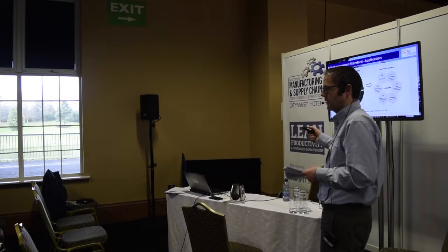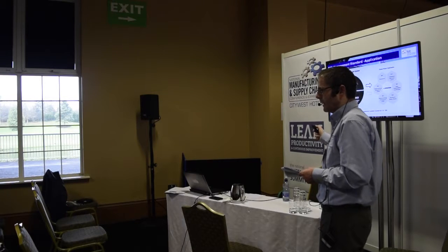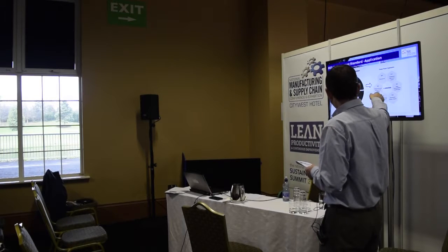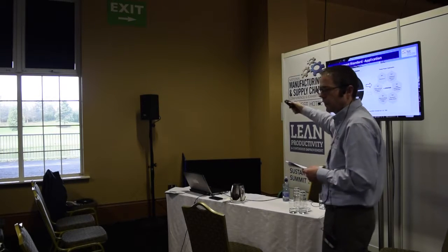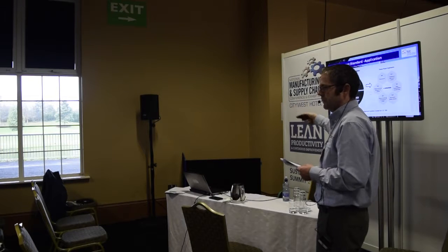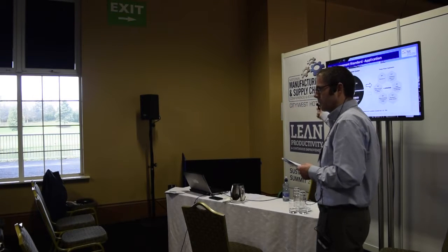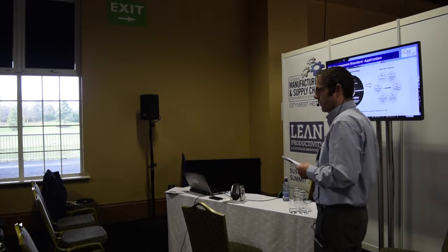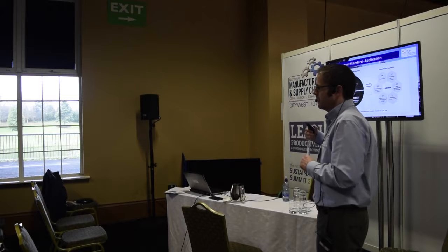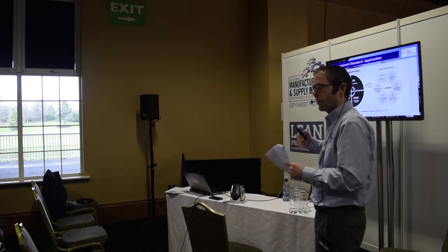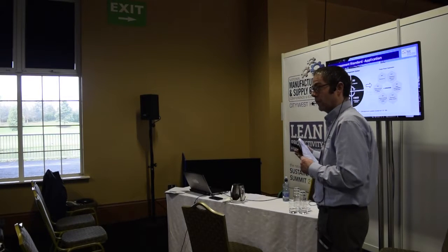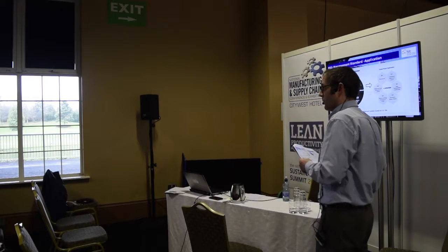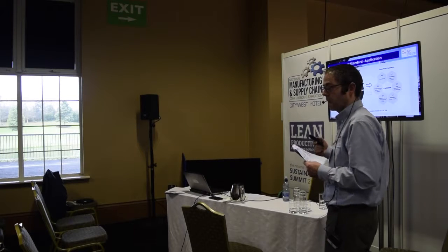You run your project, and you take the learnings from the project back into your site management system, and you use those learnings for future projects. That may be learnings about how the process worked. Was the procurement team too strong or not strong enough? Was there not enough top management support? Those learnings get evaluated, and you may improve on them for the next projects.